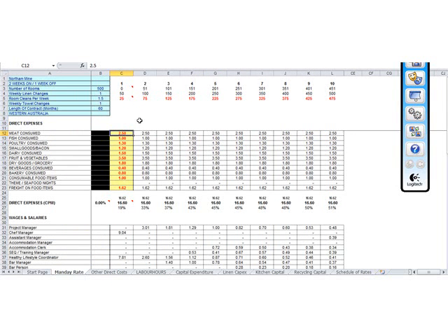So here we have the figures of 250 of meat consumed, 1 of fish, and down the line we go. So what this ends up being is per food per day would end up to be $16.60 if there was 0 to 50 people accommodated on site. Now it's important to know that if your food budget is around $16.60, that means you should be in line here with the midpoint. So the closer you are to budget, the closer you should be to the midpoint. I hope that makes sense for you.